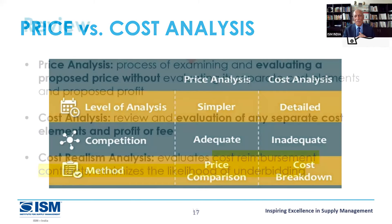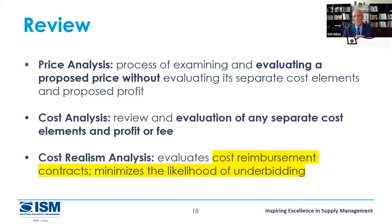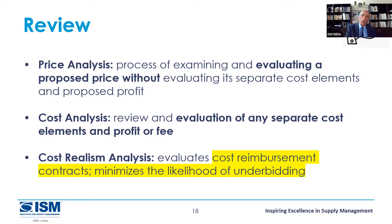Price analysis is the process of examining and evaluating the proposed price without evaluating the separate cost elements. Cost analysis looks at whether the cost is realistic. The supplier may have given you beautiful figures, but is there scope for minimizing? If you know the cost of labor in different countries — geographically, rates are different — and you know the price of each material, then you can find the realism part of the cost.